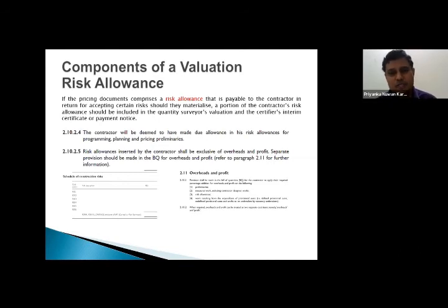Now here, this particular risk that you are mentioning here, right? That risk belongs to the contractor. Okay, if there is a smart consultant quantity surveyor who sees that the particular exterior insulation finishing system is much more expensive than this, in order to save some money, what he can do is introduce another type of finish, which may be much cheaper. Then the contractor has to omit that particular item totally. When he omits, that particular risk is also omitted. So this is not the right practice. So this has to be addressed whenever there is a risk allowance.